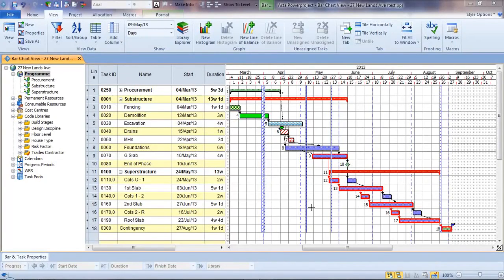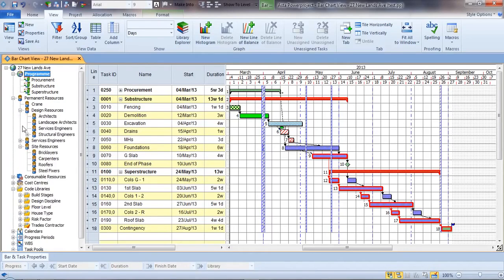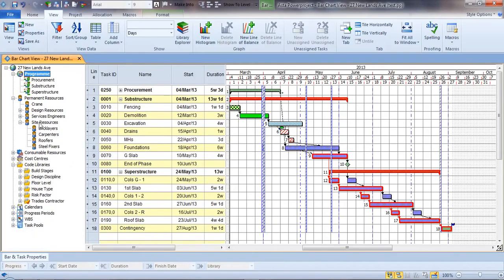So once we have the activities, then activities can also have resources and costs assigned to them. And resources are different to the colour codes which were shown, which are just responsibility codes. In the resource library, we can have different resources, and these can be hierarchically arranged. So you can have parents and children in this library. It greatly simplifies the list, and the folder level is also quite an important concept about skills.